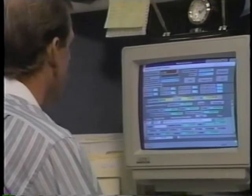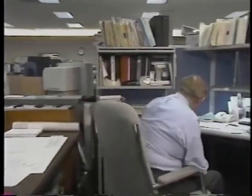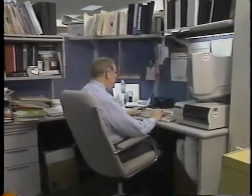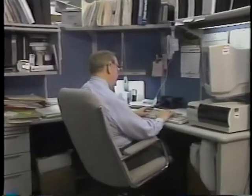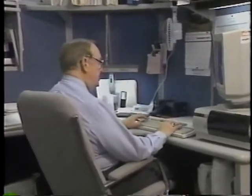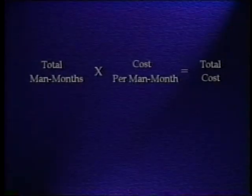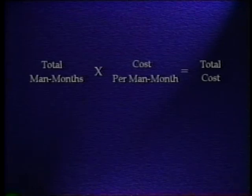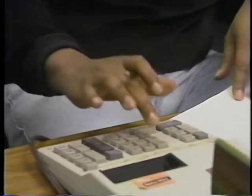A budget is developed to plan for the costs of construction management. Construction management costs can be budgeted by contract with sufficient accuracy using standard costs. The basic computation is: total man-months times cost per man-month equals total cost. Computations should be made for each applicable contract and totaled to determine the required budget. The budgeting procedures are designed for manual computation but can also be done by computer.